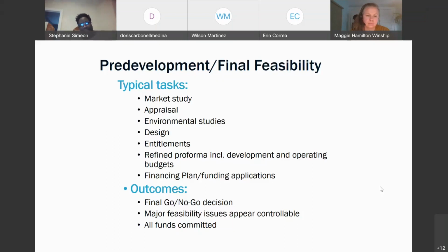And please, please, please do not have your application due August 1st, and then call your environmental consultant July 15th. You are not going to get the project in time. You need to give them 30 to 45 days for a phase 1 report. 45 days. That is the most time sensitive thing. Market studies and appraisals, you want to get those done right away. But the environmental studies take the longest, and the more detailed they are, the better for you for your funding.